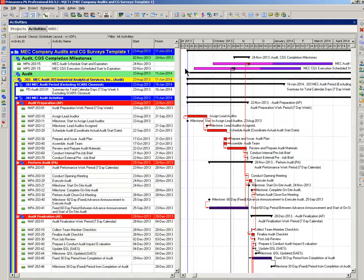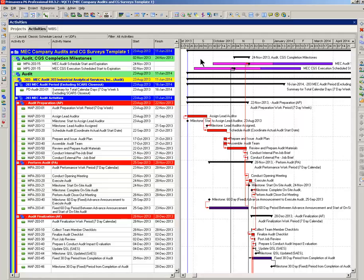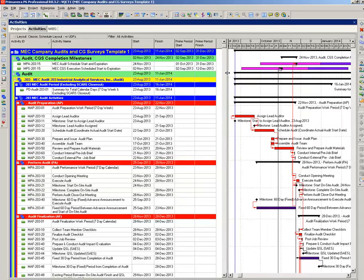The next section here covers user-defined fields producing bars in the Gantt chart. The client wanted to know at a glance if his field audits were going to start within a preordained preferred time or a time period that they called acceptable, but still they wanted it done earlier. But it was still, again, still acceptable and not considered late. This was done through user-defined fields. Let me bring this out just a little bit here.